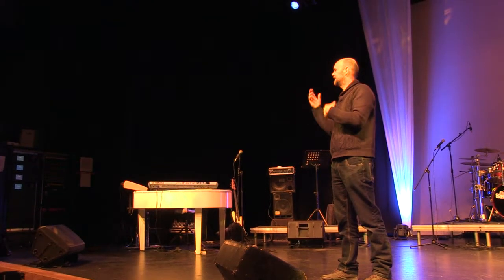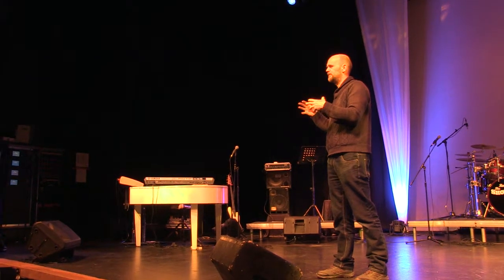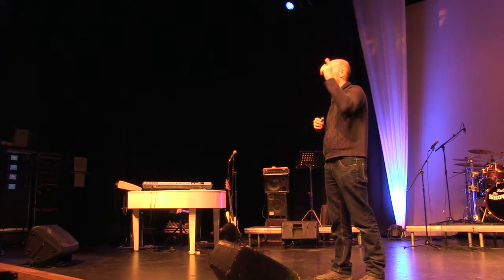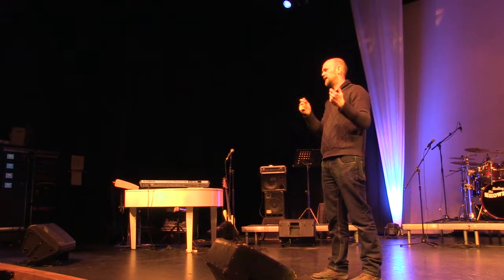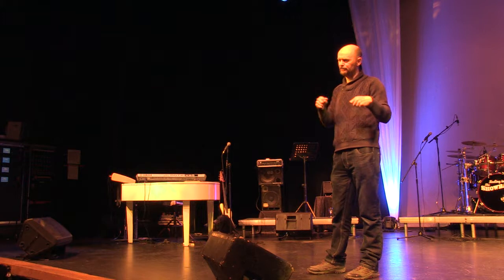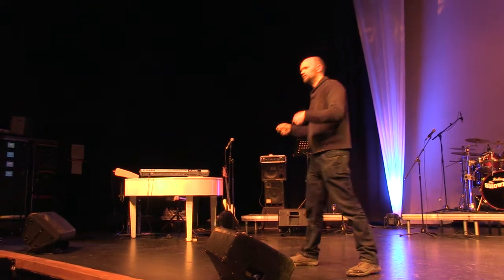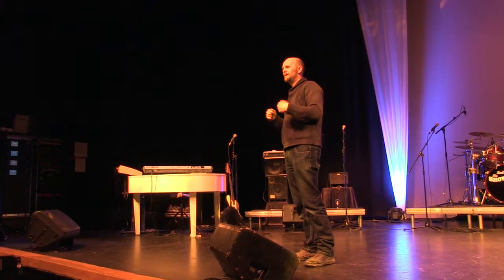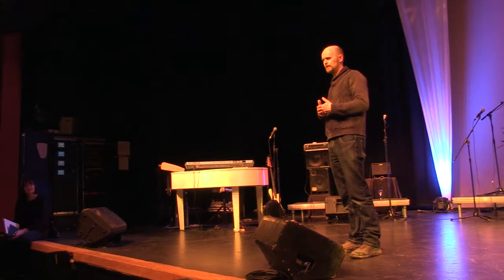So we're lucky here. Like what you were saying, we can probably put a show in quite comfortably in a day with 2 people. If you go into the studio, you're rigging off ladders. Every time you put a lamp up, focus it or move it involves climbing an 8-foot ladder, moving it, coming down, moving it, climbing it. So if you've got a 40-50 lamp rig, you're looking at.